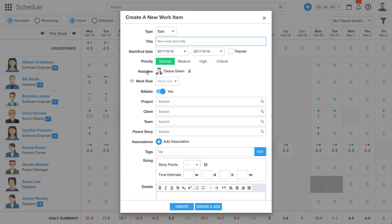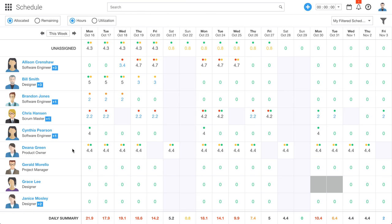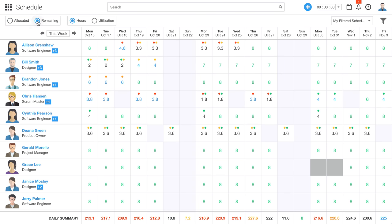Since I clicked on Deanna, it auto-populated her as the assignee for a work item, and it also put in the relevant date, which I can modify if I need to. You'll notice here that Deanna doesn't work on Friday but she does work on Saturday — so this is fully customizable in terms of what a work week is for each individual. Likewise, I can go in and specify what a work day is for each person. It may be that Deanna works a typical 8-hour work day, but maybe Cynthia only works a 4-hour work day and she's part-time. We have this remaining toggle — we've been looking at allocated hours, but what might be more useful is viewing how many hours of capacity each person has remaining on a given day. You'll see down here at the bottom, company-wide, we've got plenty of bandwidth, so this allows us to determine if we can take on new projects or not.